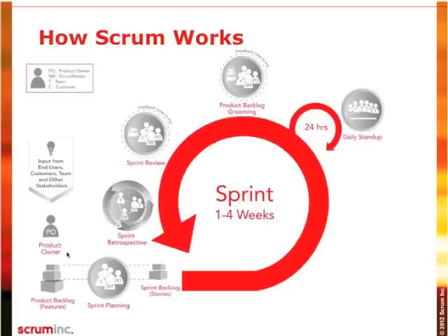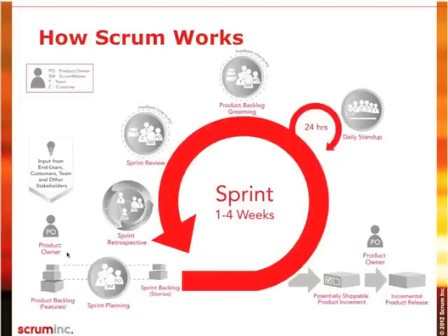As we mentioned, the objective of the sprint is to produce a meaningful increment of the actual product at the end of every sprint. We refer to this as the potentially shippable product increment. Over time, these potentially shippable product increments accumulate sprint to sprint as the team finishes work. And here again, it's the product owner's responsibility to monitor the business value that has been created with each of these potentially shippable increments, decide when enough new business value exists to be worth shipping to the customer, and at that point, they trigger a new product release and the new product goes to market.